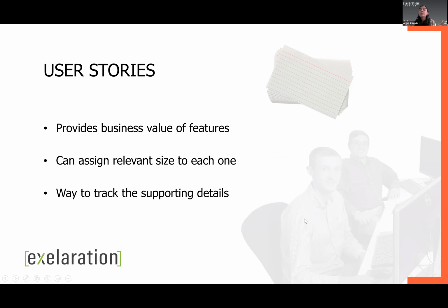So how do we keep track of what work we want to have done? This is where user stories come in. This is the business value you're providing. The most common method of this is "as a blank." So as a user of the website, I want to log into the website so that I can access my account.